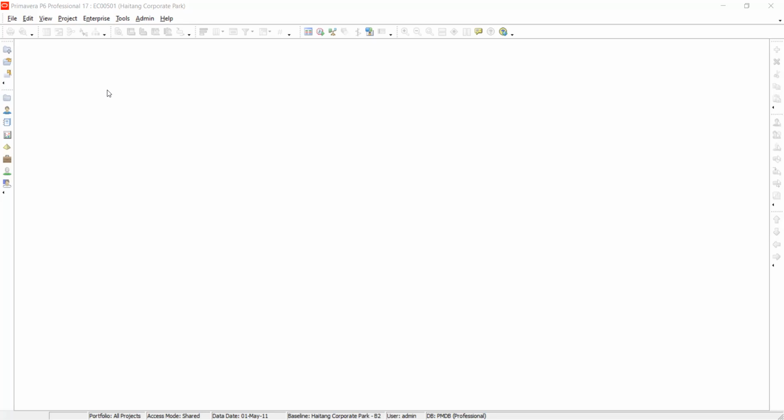Yeah. So in case a project has a high priority and another one has less priority, then when you do resource leveling, most of the resources are going to be assigned to the project that has higher priority than the other one which has less priority. You've got that one? Yeah, so in case there is a shift in resources, as it is doing resource leveling, it is going to shift the resources from the one that has less priority to the one that has high priority.